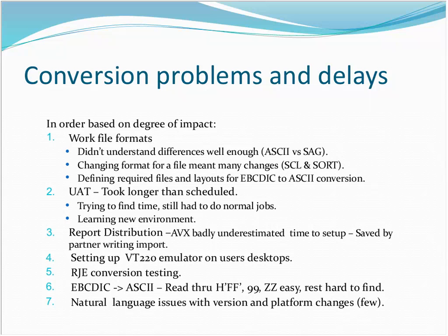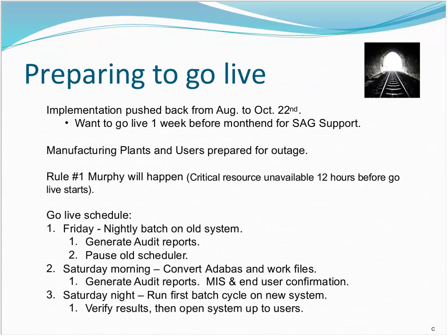2 weeks before we go live, we're running around like crazy trying to get these outside people fixed. If it was a small office where people controlled their own PCs, that wasn't too hard to do. But some of these distributors are big multinational companies, and they don't change the software on their PCs very easily. It's a lot of work for them, and they have their own change control procedures to make these changes. So it was a big struggle to get those people converted.